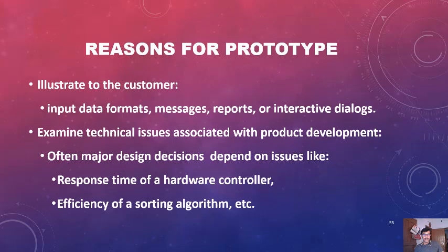Often major design decisions depend on issues like the response time of a hardware controller, the efficiency of a sorting algorithm, etc. These types of issues are checked beforehand, before you go to develop your actual software. At the first stage, you can clear all those steps.